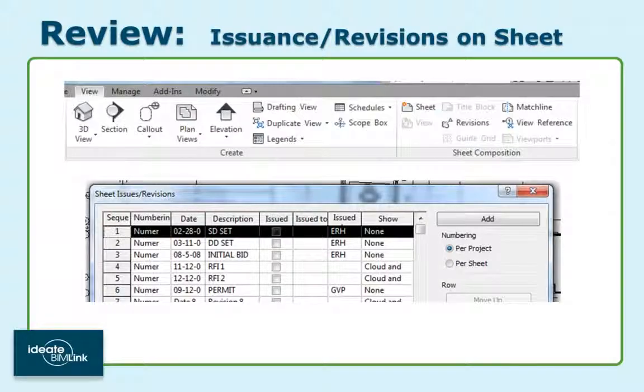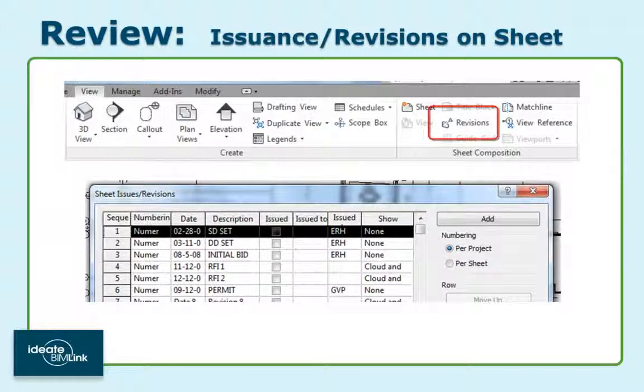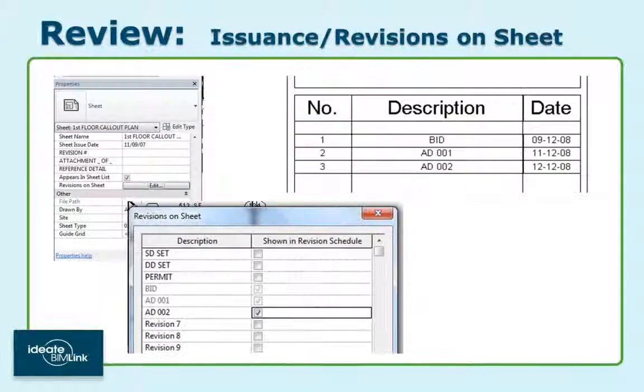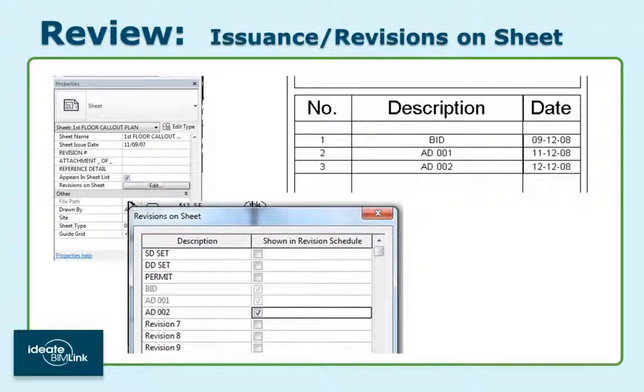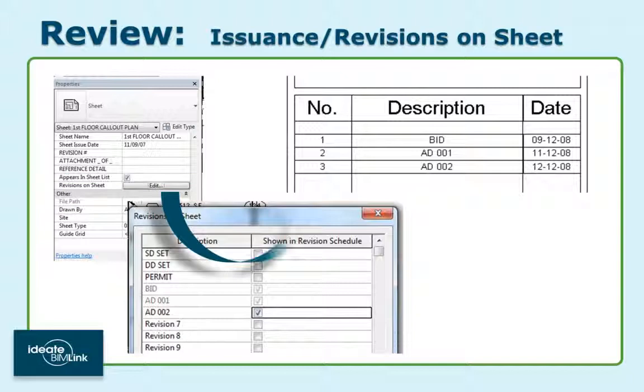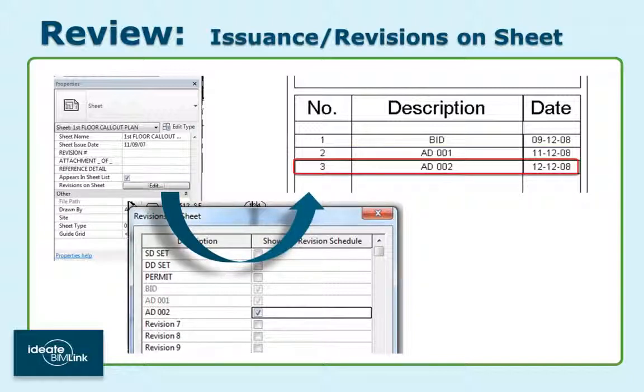The second tool that supports revision management is the Revision tool found on the View tab. This tool can be used to manage not only your revisions, but also is used to control sheet issuances. This revision tool works hand-in-hand with the Revisions on Sheet button found within the sheet properties. When the revision sequence is checked, as shown, it will update the revision schedule, which can be nested within the title block family.